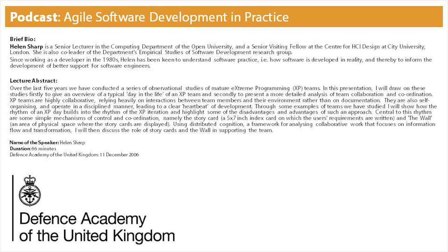So again, Joe Bloggs estimated this would take a day. So it would be JB 1 day in green. Then there's initials and actual on the right-hand side in blue: when people picked up the card, they'd spend half a day on it, they'd write their initials, and how long they'd spent on it. And some of these cards would have several of these initials and actuals on them. So it adds up as time goes by with the date. Don't know why the date tended to be written in black.